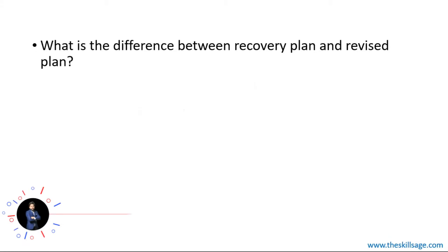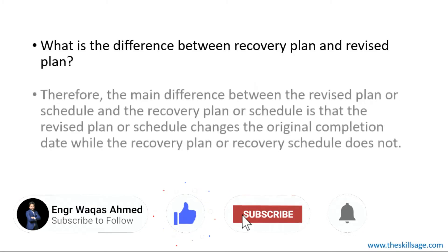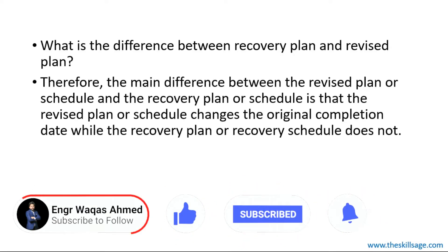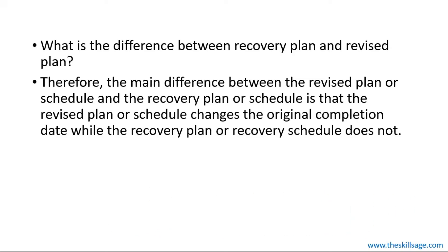What is the difference between recovery plan and revised plan? I'll give you a glimpse and after that we will get into the details. The main difference between the revised plan and the recovery plan is that the revised plan changes the original completion date, while the recovery plan does not change the project completion date. That is a major difference. If someone asks you in a job interview as a planning engineer, you have to keep this in mind — it is all about changing the project completion date.